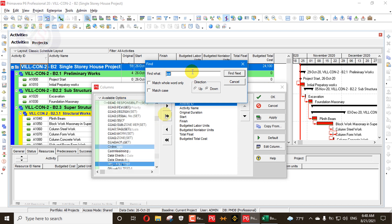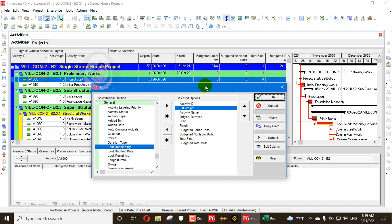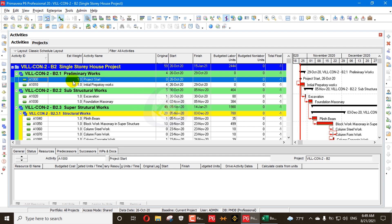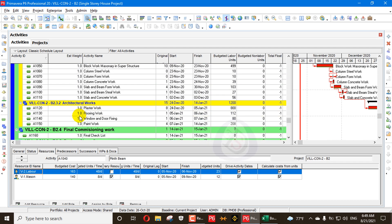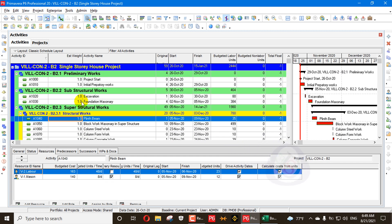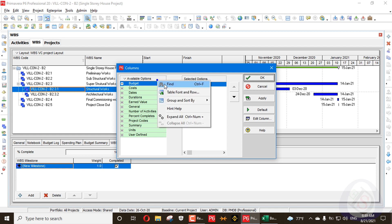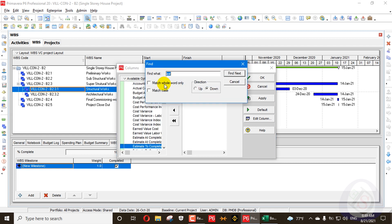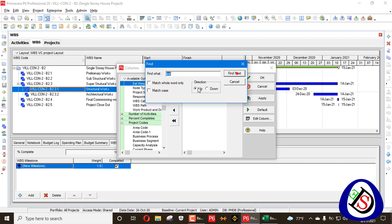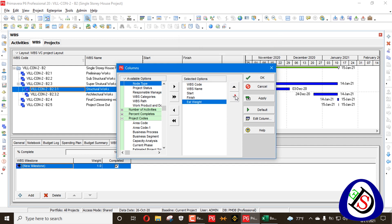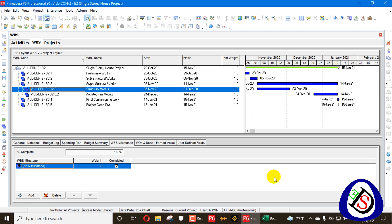I'll type 'Estimate Weightage' and press OK. You can see the estimate weightage column — every activity shows a value of 1, meaning 100%. No weightages are applied yet. If the value were something like 0.3, 0.2, or 3.4, that would mean a percentage is assigned. I'll also add the same estimate weightage column for WBS stages. WBS cannot be imported from Excel, so I will enter those manually.